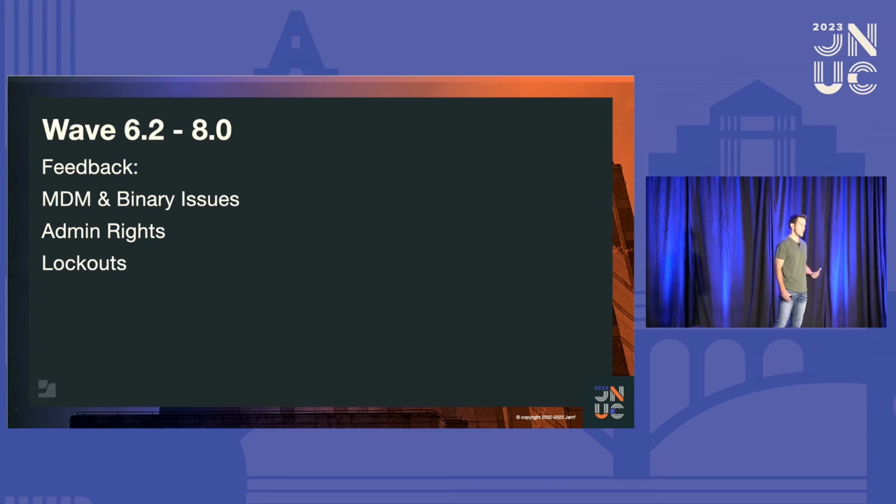Our ELT team and our SLT team, man, that's real fun to say. I should have practiced that a little bit more. SLT team had a competition. Non-nefarious, no one was getting fired, nothing like that. But they were trying to see who could be 100% compliant the fastest. That worked great because that meant the people manager of 2 people was fully aware of what Jamf Connect was. And so when someone complains up the chain, every single person knew that that was the direction the company was going.